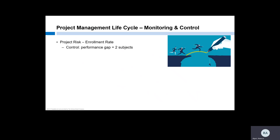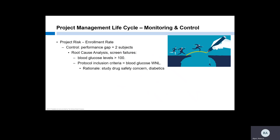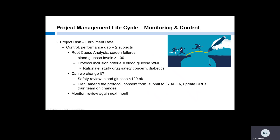As part of our control process, the data tells us that we have a performance gap of two subjects in the first month. Why? Only one subject having withdrawn consent isn't indicative of a trend yet — that's something to watch, but let's not worry about that now. Let's do a root cause analysis and pull the data to identify what caused each of these two subjects to screen fail. In reviewing the source data, we see that both subjects had blood glucose levels over 100. Our protocol eligibility criteria says that subjects have to have a blood glucose within normal limits at screening. Why is the protocol written that way? According to the PI, there is an increased risk with the study drug in diabetics, so she set the inclusion criteria to be very conservative out of concern for subject safety. There's our root cause: the inclusion criteria is restrictive for patient safety. Now that we have our root cause, we need to see if there's anything we can do to change it. There may not be, and we may need to revise our enrollment rate expectations.